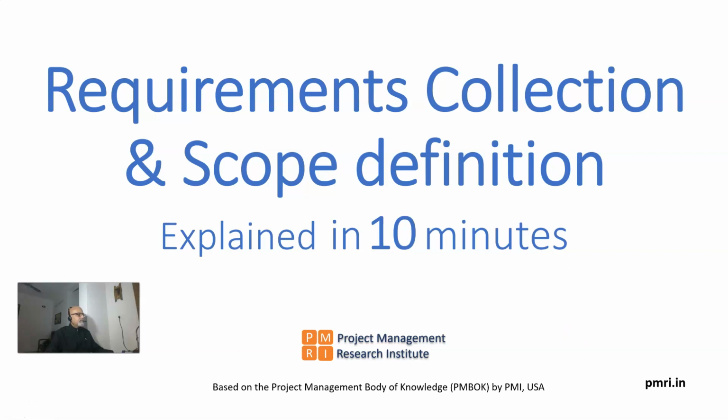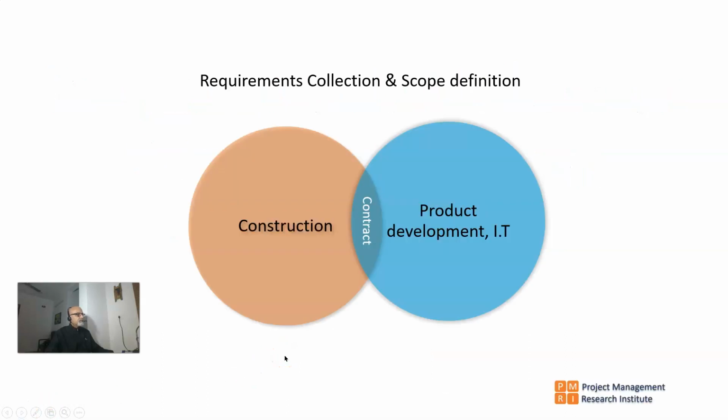Hello. In the next 10 minutes, I'll explain the requirements collection and scope definition process. If you are working in construction projects, the requirements collection and the scope definition happen prior to signing the contract. But if you are in product development or IT related projects, detailed requirements collection and scope definition happen after signing